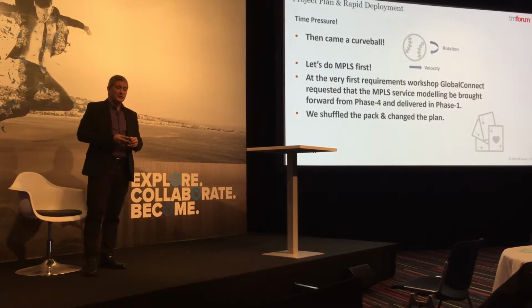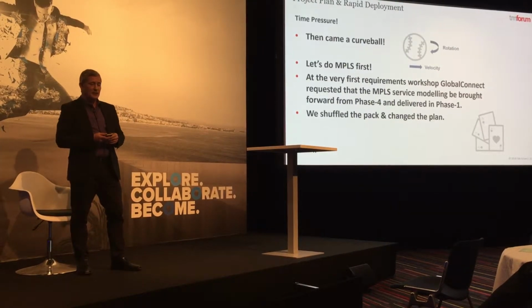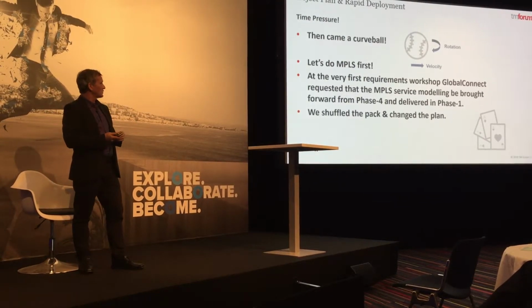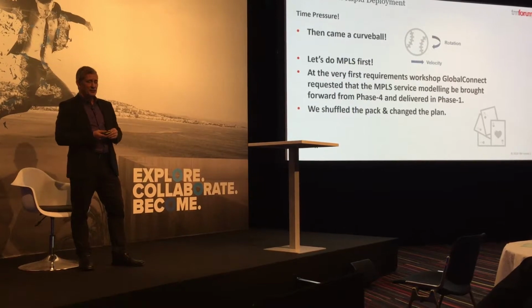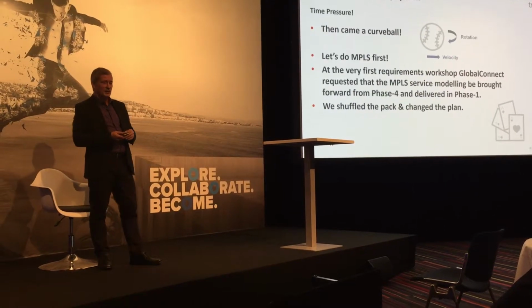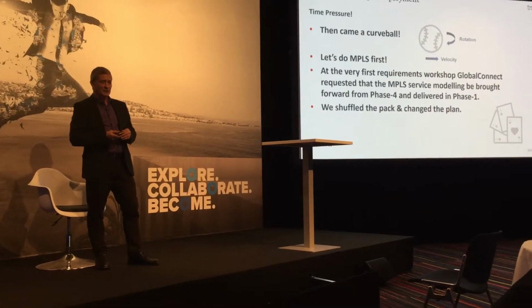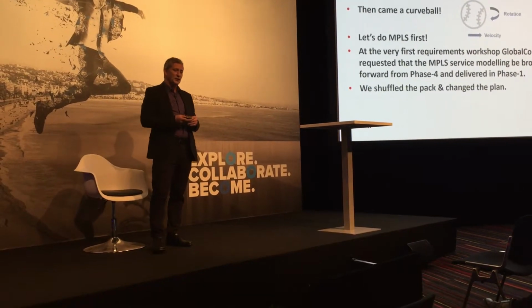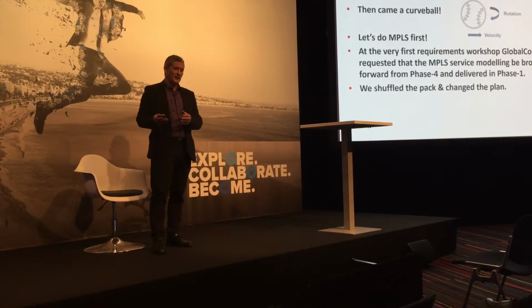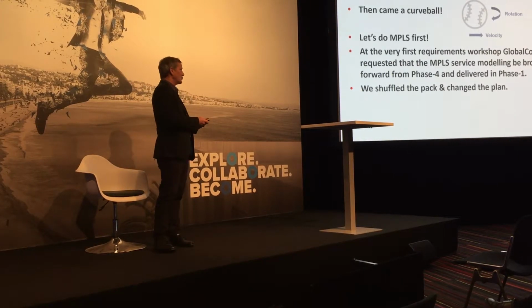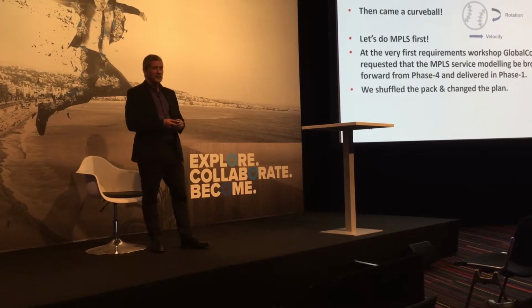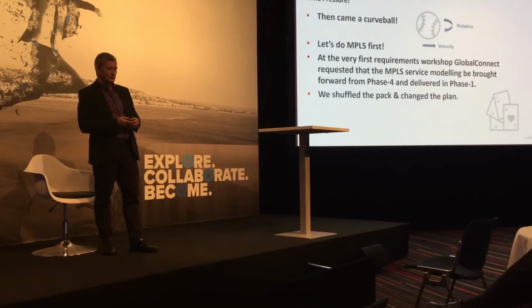But to add to the time pressure, Global Connect decided to throw us a curveball. At the very first requirements workshop, they decided that their business priorities had changed and they wanted to focus on MPLS services first. So we had then to take all of the MPLS components out of the later phases and bring them forward into phase 1. But this was a good test of the flexibility of the solution.